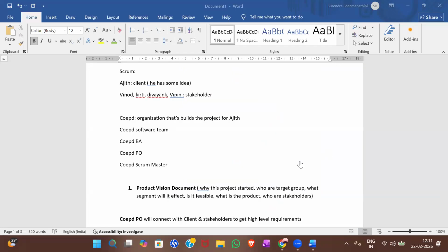Yes, low CP and high BV is a prioritization technique. Use it to prioritize your requirements, the user stories, in the product backlog. Requirements and user stories are not different. In waterfall, you place requirements in a document. In Agile, you make requirements into user stories.